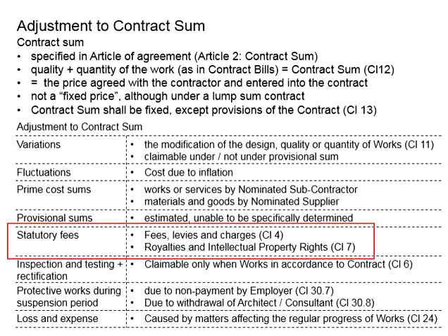Although it is mentioned here, it is allowed for the adjustments of the contract sum. If you read the clauses in the PAM contract, it is by default deemed that the relevant costs should have already been incorporated during the tendering process.